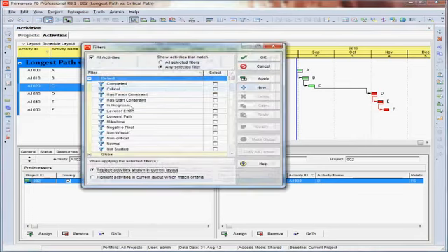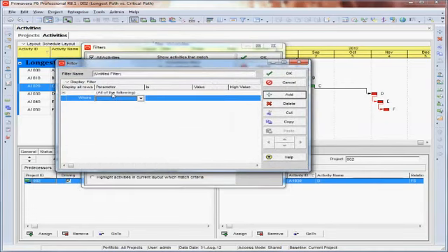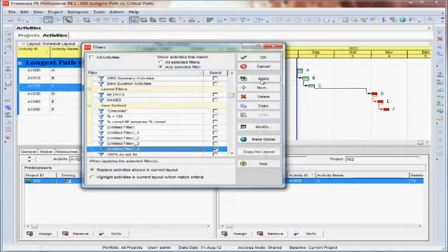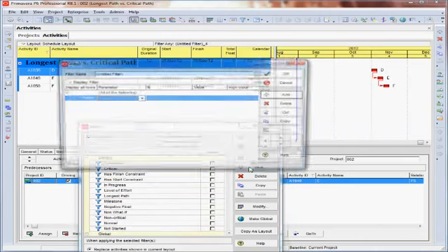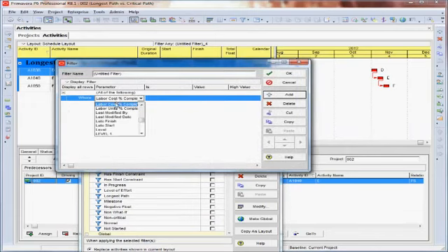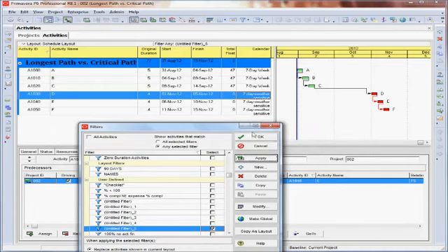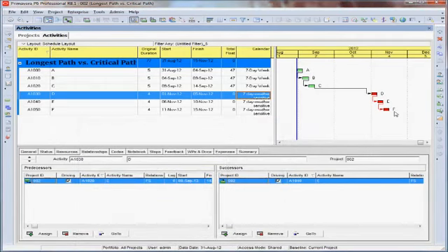Let's try total float method. If we create a new filter where total float equals 0, click on Apply. We find that the critical activities are only D, E, and F, and there is a gap from the data date till D. If we use another filter, where the longest path, we will find that the longest path starts from activity A till activity F.